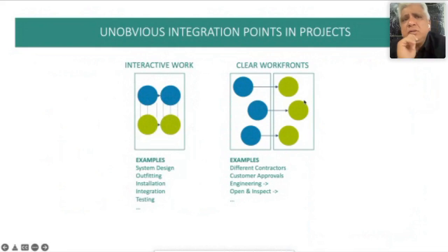The other example, which is not an integration point per se, but just a best practice, is if you are doing a construction project, for example, you want your civil work to be done before the equipment installation starts. Or you want your engineering to be all done before the procurement starts. So even though these activities can flow through, as a best practice, you want to integrate all these three, get it done, and then pass it on to the next set of resources.